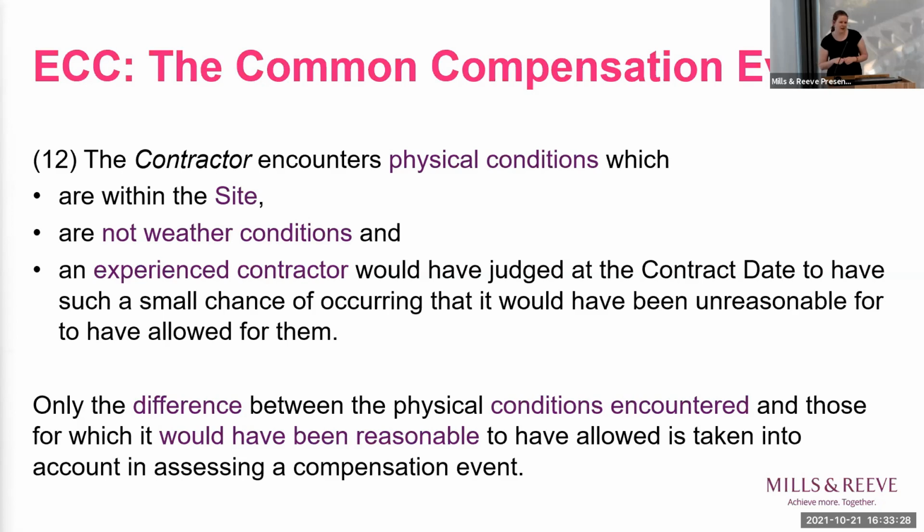If you're a PM, a tip is you turn all of this into a question. Is there an event? Did it occur within the site? Was it weather related? And would an experienced contractor have caught this? And if you're the client, all that wonderful information that you have needs to go in that site information. You need the surveys, you need the as-built, you need the historic data that you hold.